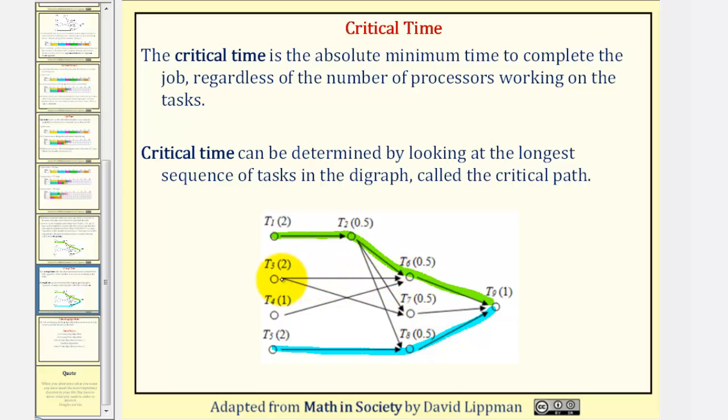There's another example. We could go from task three to task seven to task nine. Notice this path takes two plus 0.5 plus one, or 3.5 days. So still the longest path is four days, our critical time.